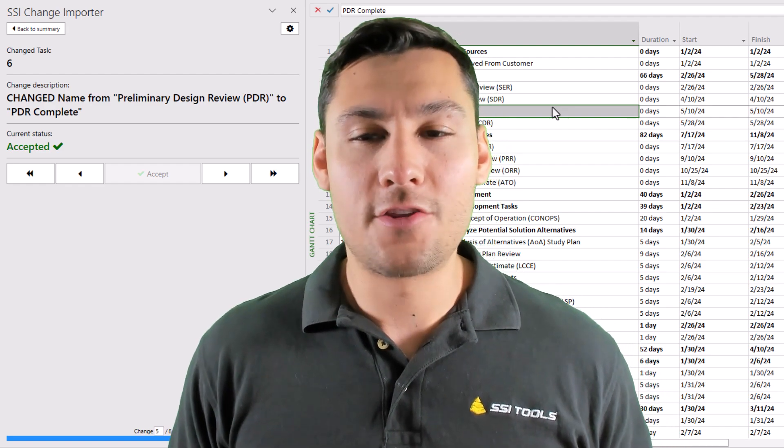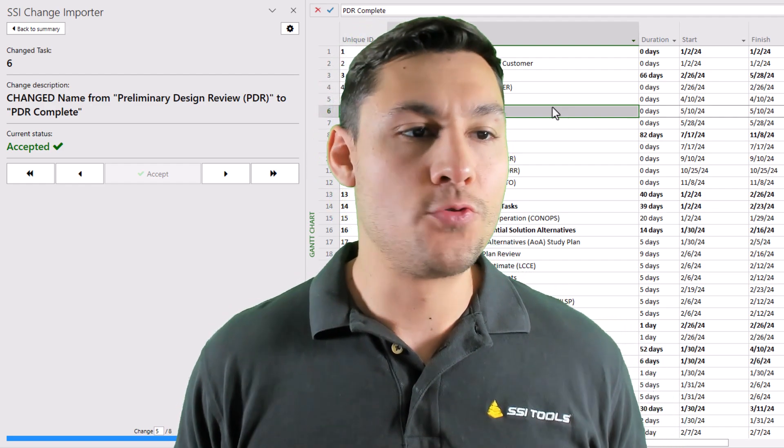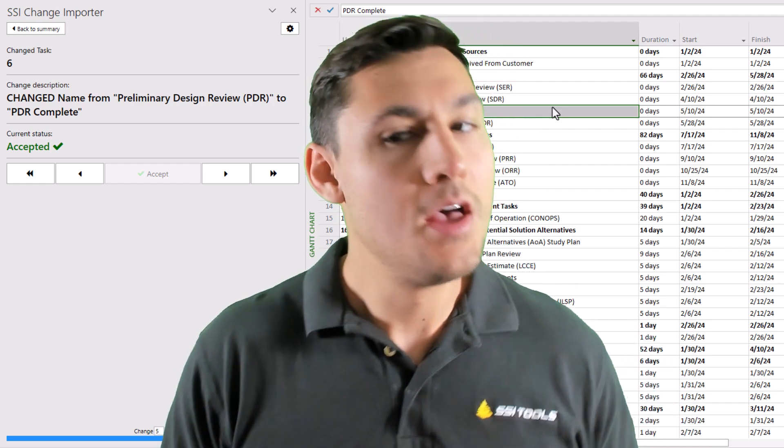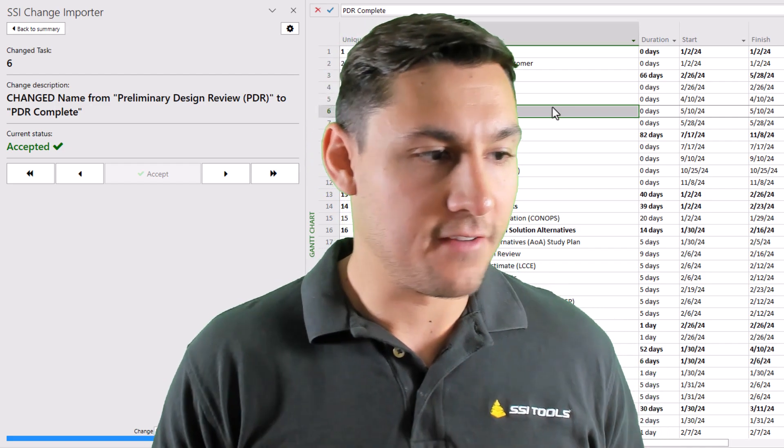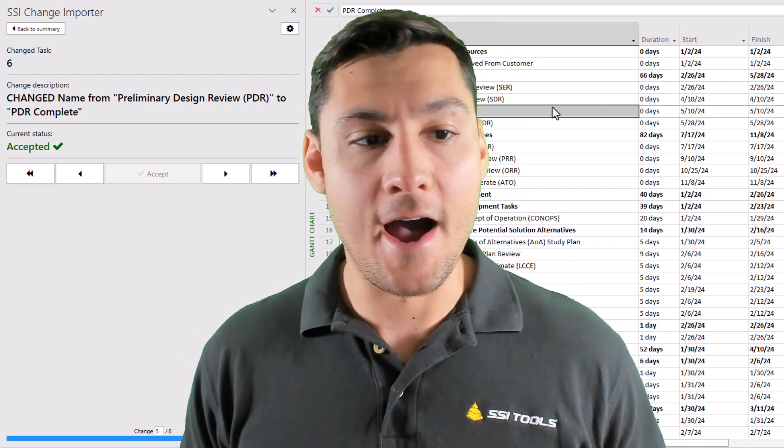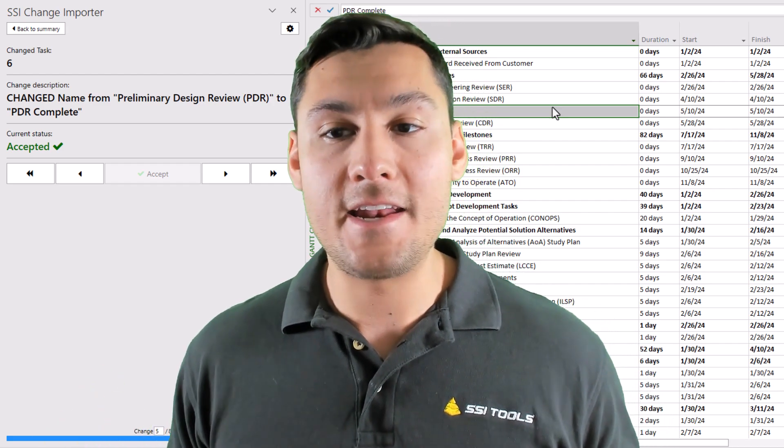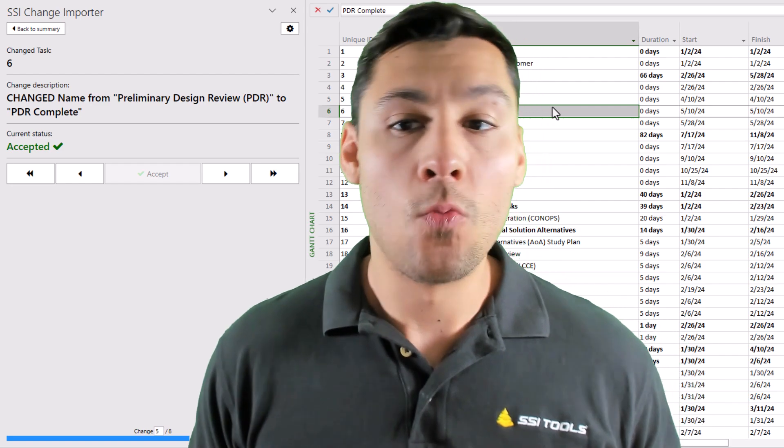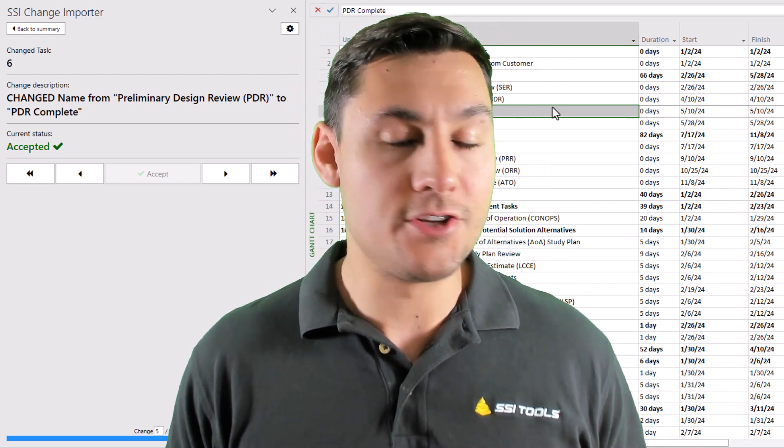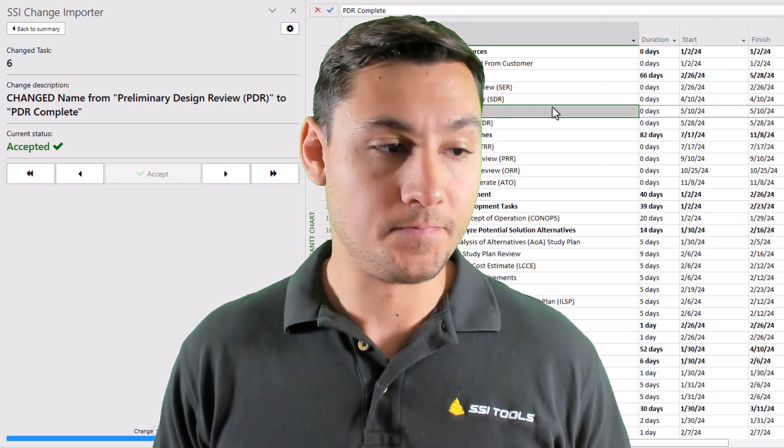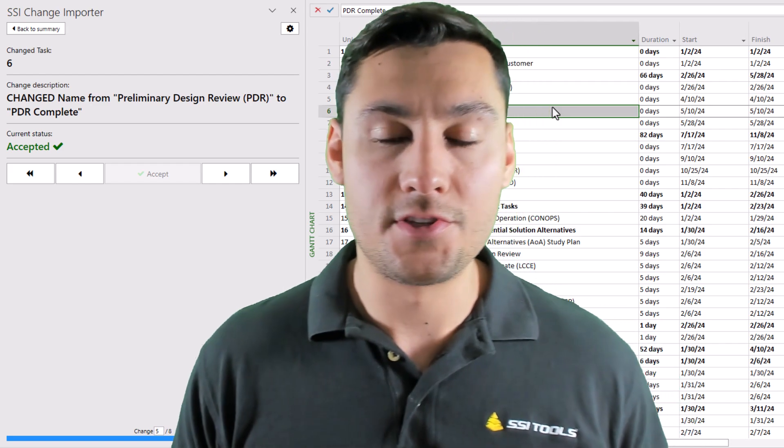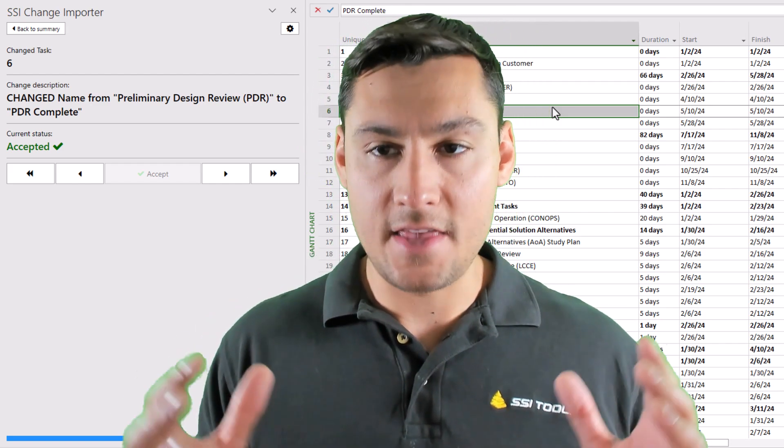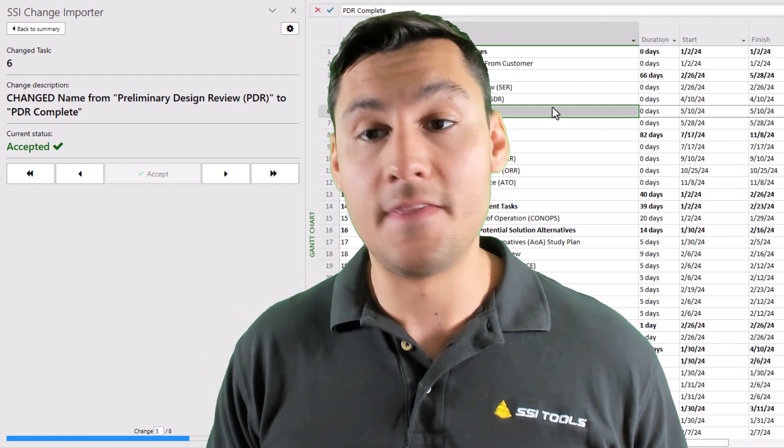So let me talk through a couple different scenarios now where these tools may be useful to your team. First, let's imagine that you have a large project file and it's just a single file, and you want to have multiple people editing that file at the same time. Well, Microsoft Project doesn't have any good way to allow multiple people to access a file at the same time. But with these change tracking tools, what you can do is you can take the kind of live working file and you can save copies of it.